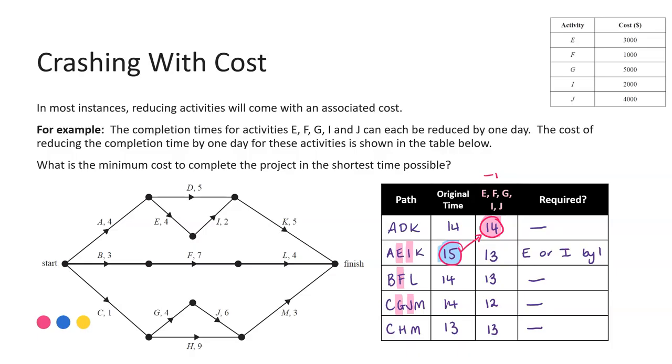And we can see from the table that we've got there, that activity E will cost us $3,000 and activity I will cost us $2,000. So obviously, if I only need to do one of them, I'm going to choose the cheapest option. So that means in order to achieve that minimum overall completion time with the minimum cost, the cost is going to be $2,000. And I'm doing that by reducing I by one day.